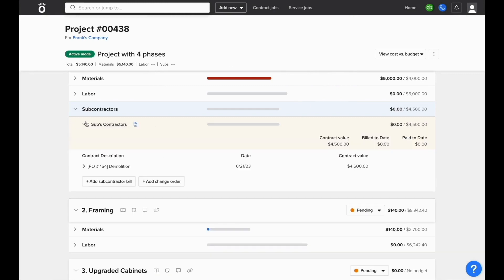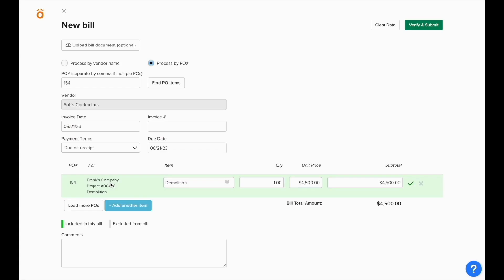If we expand where it says subcontractors, we'll be able to see a breakdown of their contract value to date and we could start logging bills against the contract that we uploaded.